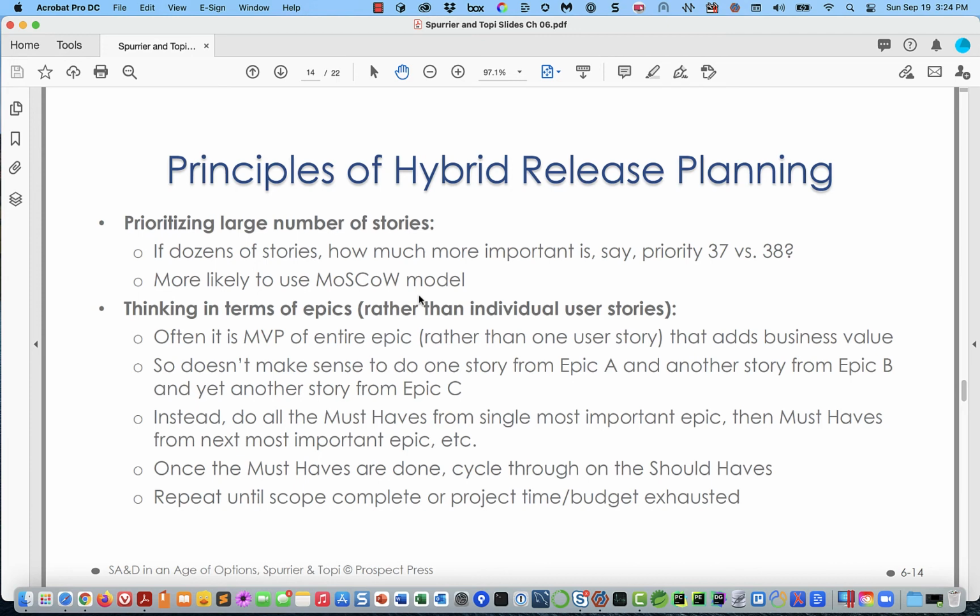And so what the agile people are doing is delaying collecting the detailed requirements on the rest of the feature sets, the potentially bloated portion, with the idea that they'll deliver this MVP, this minimal viable product, and then the users will realize that that meets their needs, that they weren't so hungry as they thought they were.